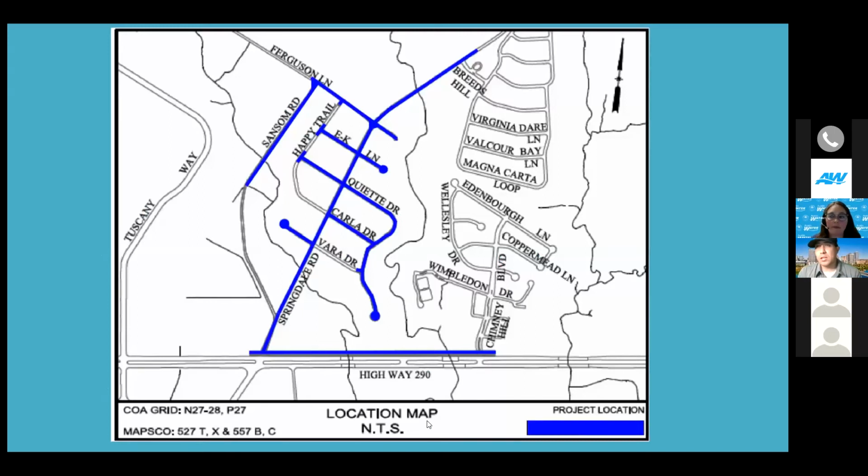Looking at the project, and I know you haven't seen all the details, our main focus when we first start this project, and I think this may answer a subsequent question in regards to a timeline and schedule, is that we're still producing the actual schedule now. There will be some directional bores and digging underground happening along Highway 290. That's the main area where we're going to start as material comes in.